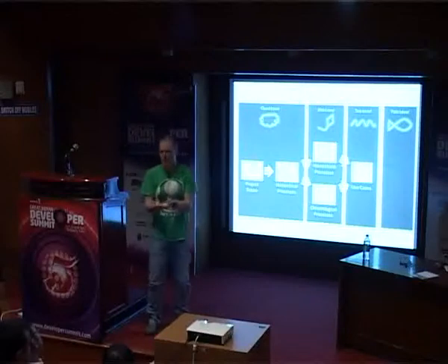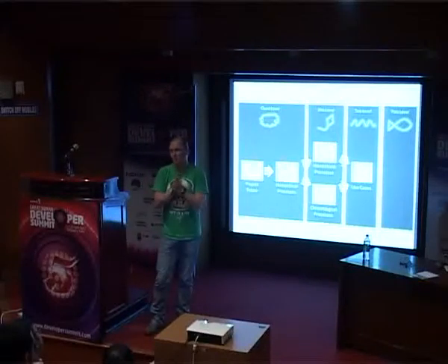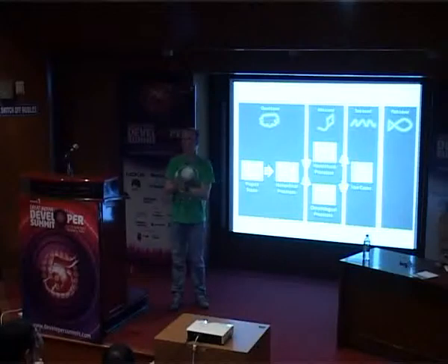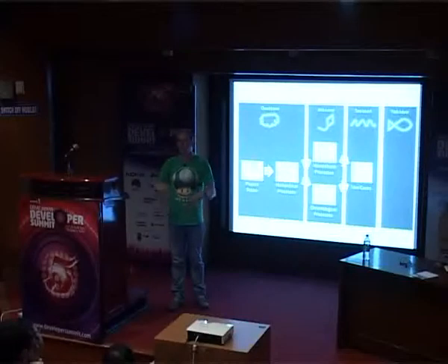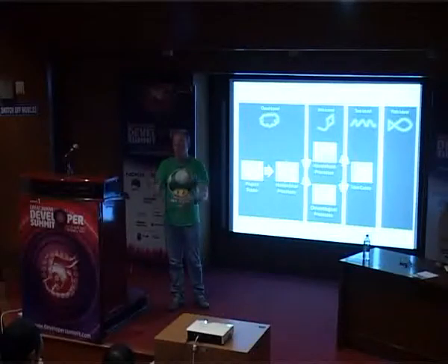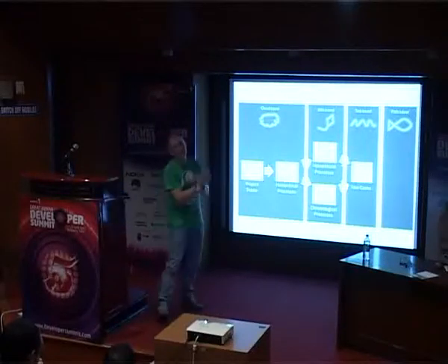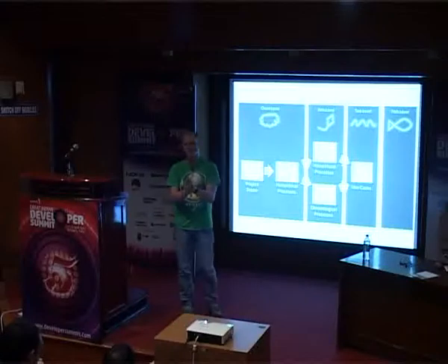One of the use cases, which is a very good, wrong example actually, consisted of 65 pages of text, which for a developer is quite long. Developers don't read text. We look at pictures and think, okay, we can build this stuff. Cool. Let's go out there and do this. So it had 65 pages of text. The basic flow for this use case was 12 pages long.